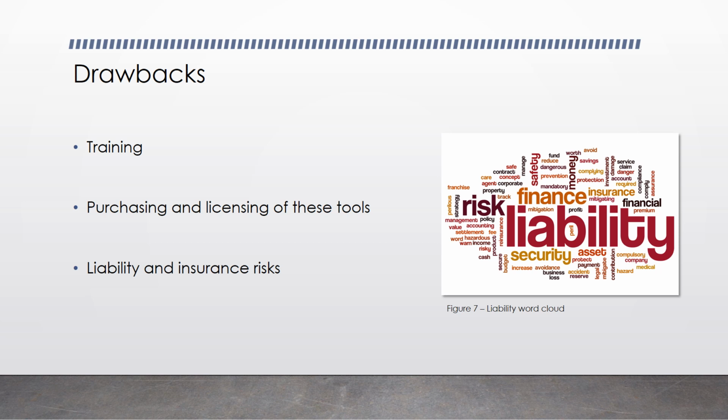Liability and insurance risks. Traditionally, contractors rely on drawings provided by the designer, and so will have no significant involvement in the design. So they can sue designers for professional negligence if errors are found in the drawings. However, BIM allows the contractor to actively get involved in the design process. This means accountability for errors and negligence for insurance and claims can be hard to determine.